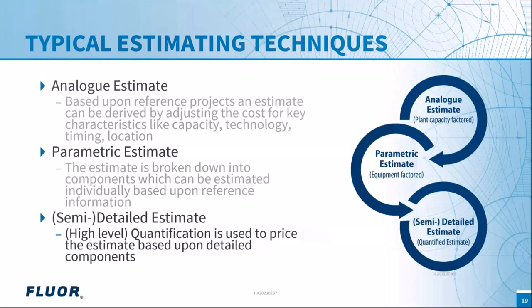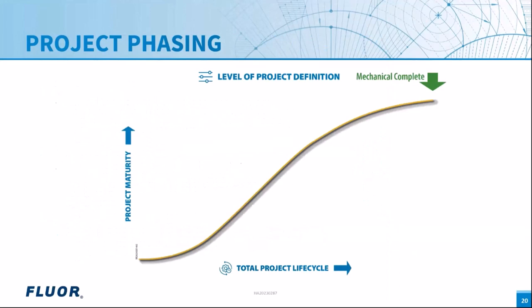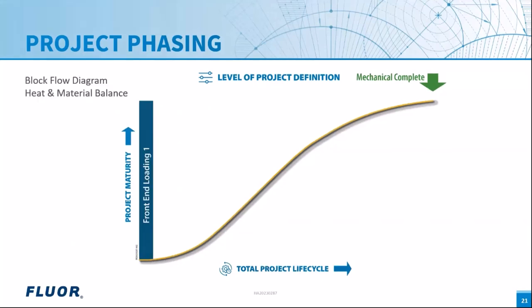These are the traditional techniques. Now we want to examine how we can use them — or whether we need to change them — for new technologies. But first, let's look at the timing of when we apply which technique, by discussing project phasing. The total project life cycle starts at 0% completion and ends at 100%, what we call mechanical completion.